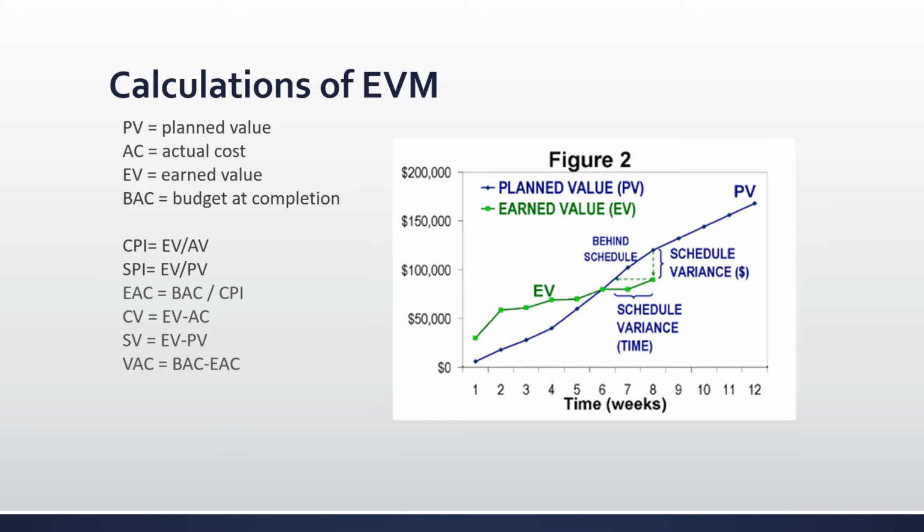And in order to get the budget cost of work scheduled, it's PV equals BAC times the percentage of the planned work. Budgeted cost for work performed, or earned value, the amount expressed in the hours of the actual work performed, that's EV equals BAC times percentage of actual work. And then the actual cost of the work performed is the sum of all the costs that actually accrued to the task to date. So let's talk about some of the indexes that you see on here.